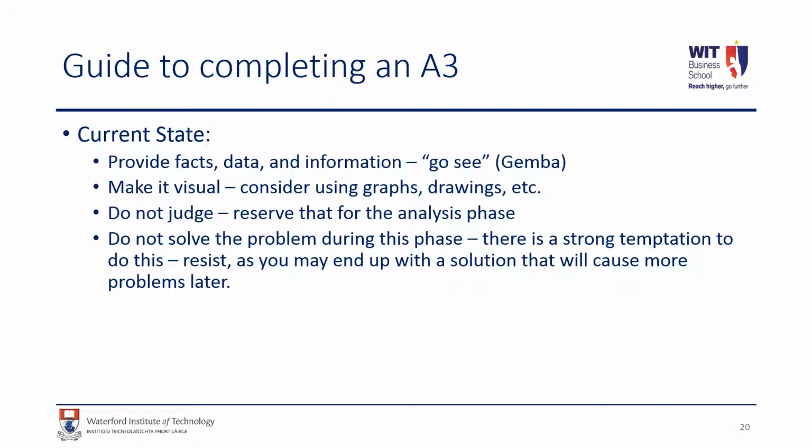So don't try and solve the problem during this phase. Okay, and there will be a strong temptation to do this, okay? But you don't want to jump ahead to this stage unless you've analyzed all the relevant data. So this will come later. And that's important with the A3. You stick with the step-by-step approach. Don't jump ahead and skip steps. So here we're only presenting the current state.